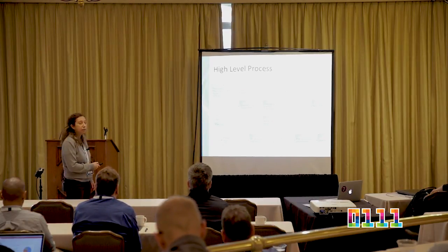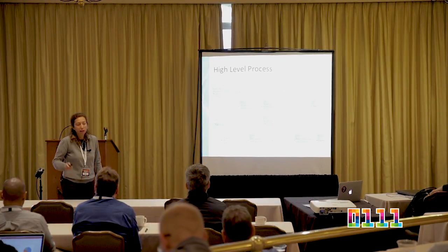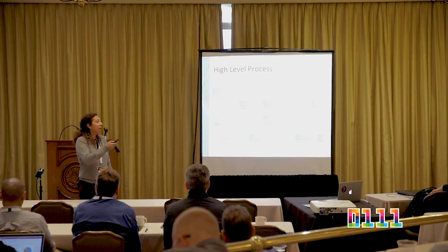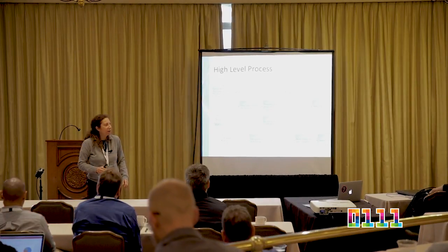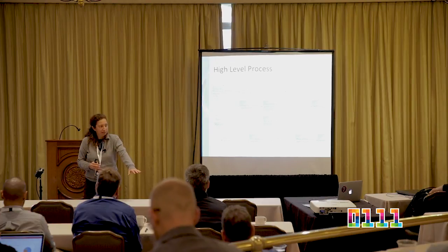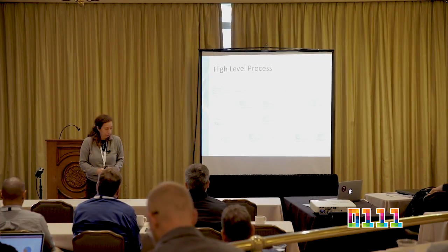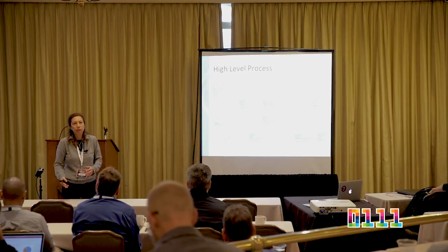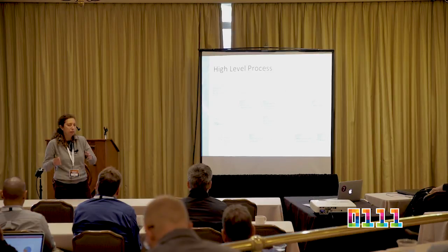It's true you do need to develop documentation. Okay, but I'm going to go out on a limb here and say that while your embedded developer is writing code to that development board, your hardware engineer can, in parallel, be developing a schematic as part of that sprint.